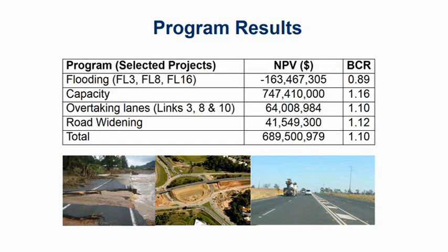Take, for example, the Horton flood immunity project. That was almost $500 million, but the closure times are only about a day a year. So the closure times are fairly short, and it's very expensive to fix that up because it's a floodplain, about 16 to 17 kilometers. All of that would have to be raised just to reduce closure times for about a year. So those sorts of projects pulled it down, and overall not a particularly good idea given the returns you actually get back for the costs that go in.